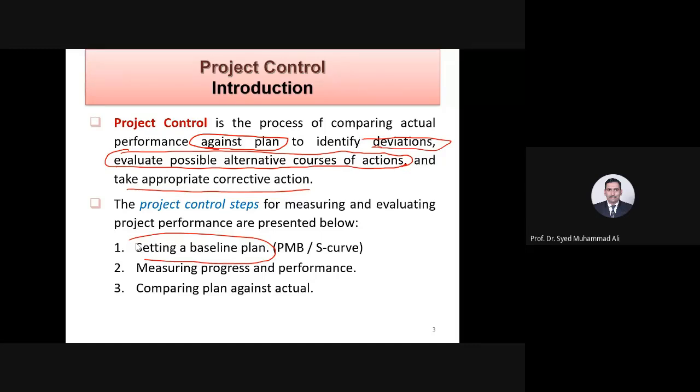So that is the tool of getting the information. It is generally not recommended that you use a cell phone or mobile phone and ask. Yes, you can call, you can ask, have an idea, maybe try to resolve any issues, no problem. You can communicate on cell phone, no problem. But formally, it should be a pro forma which is filled by somebody. It has a name. For example, engineer Arif Khan, site engineer for section 1, which is RD 0 plus 000 to 5 plus 00, for example.